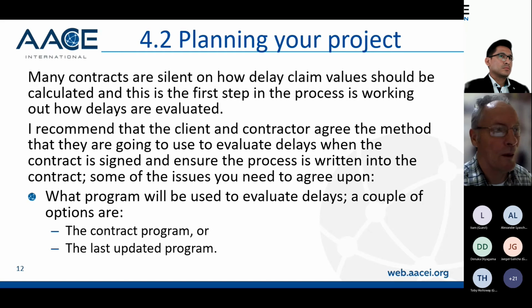So you might decide to update the program every month, and therefore you add delays to the latest updated program, which is a windows analysis. And again, you need to agree on those. And a lot depends. If you're doing delays at the end of the project and you haven't got updated programs, you may be forced into doing impacted as planned.